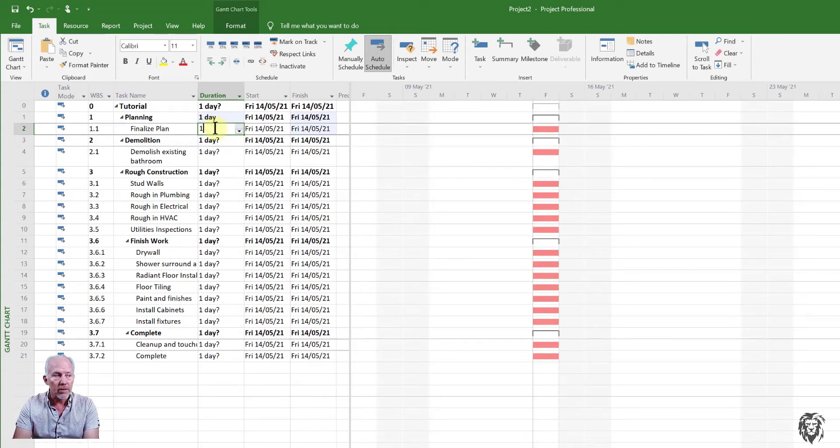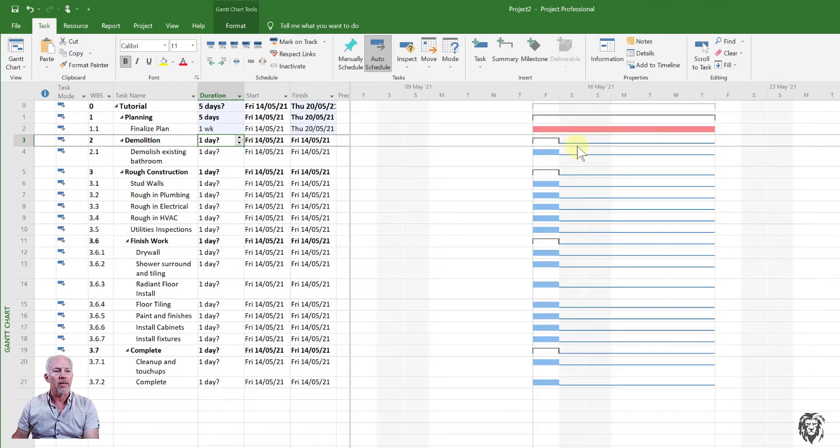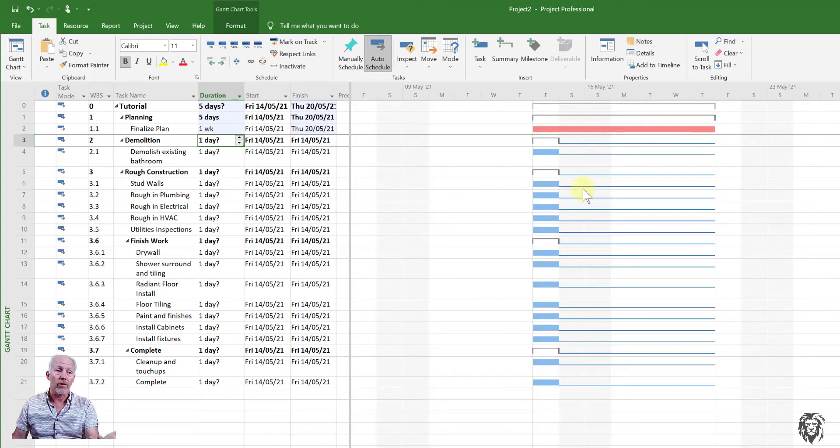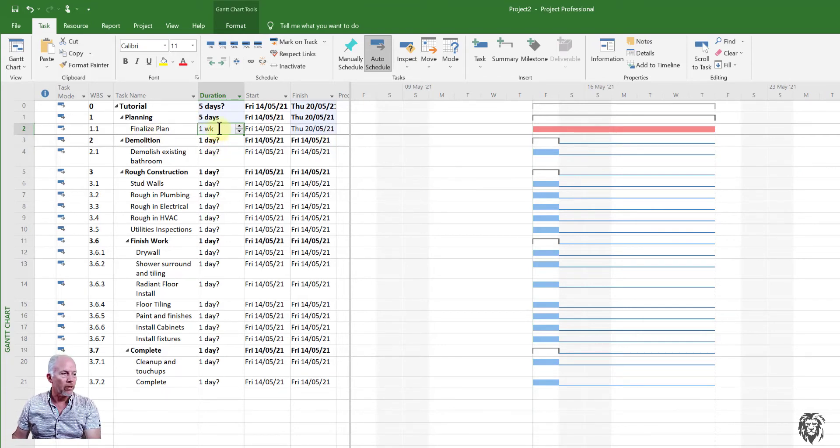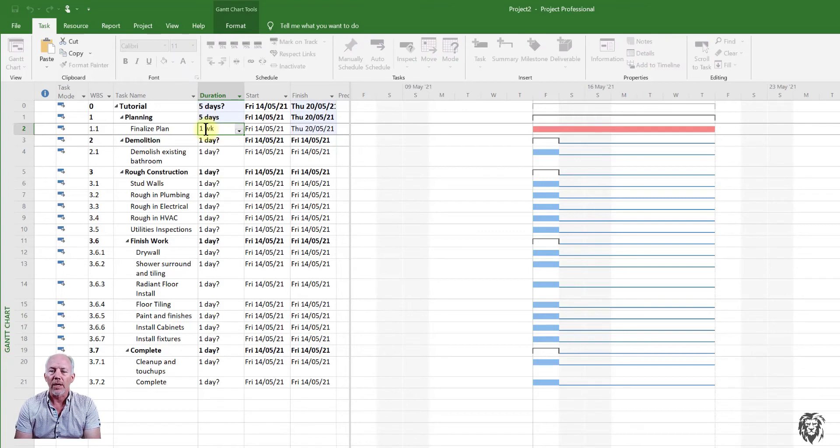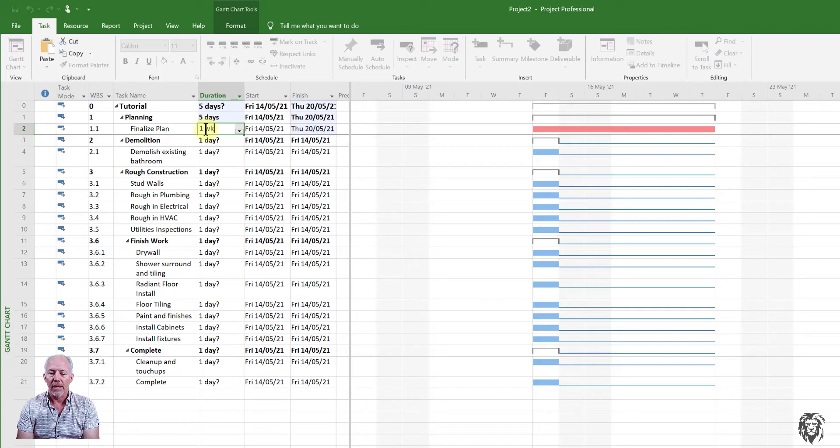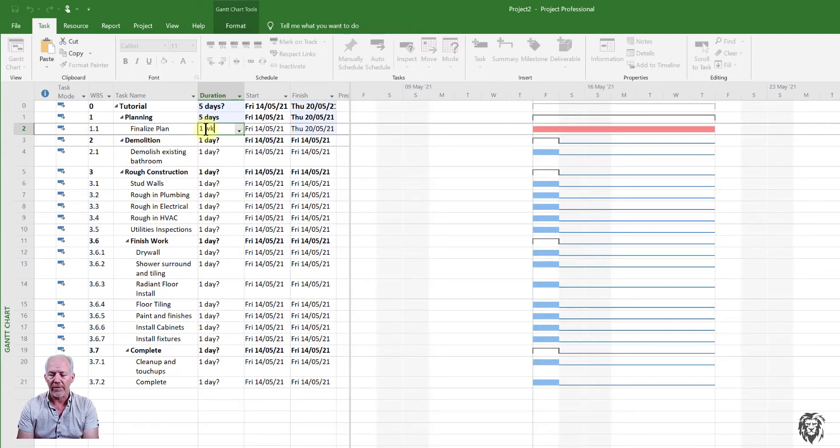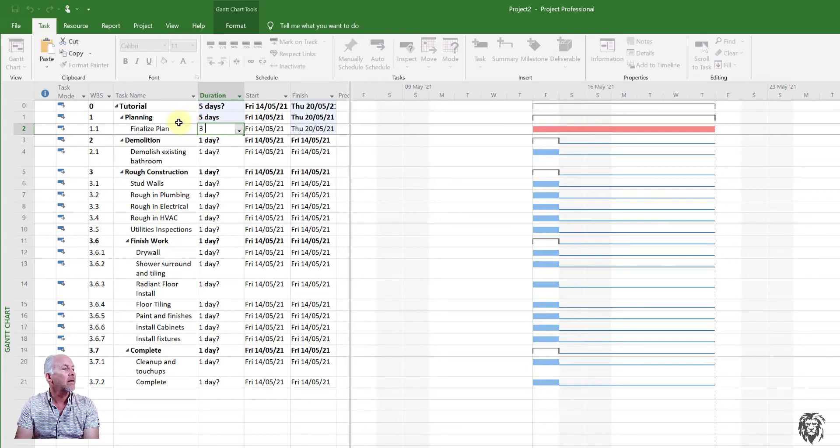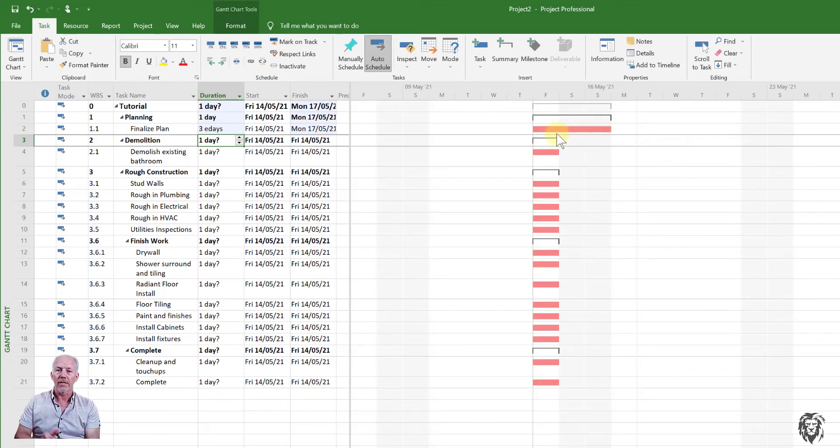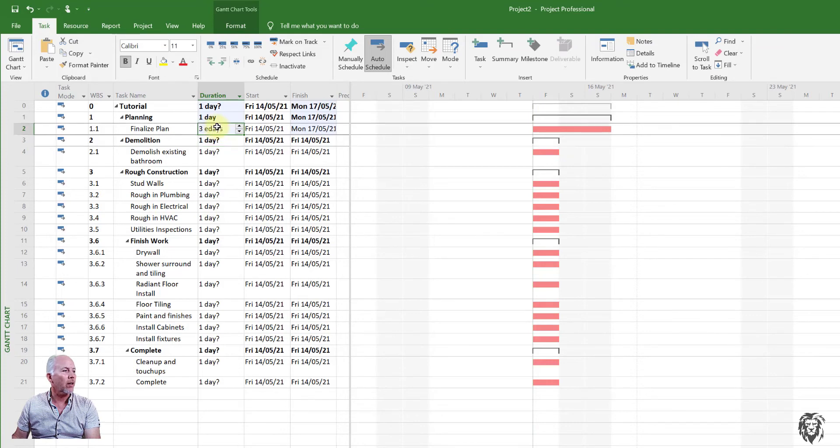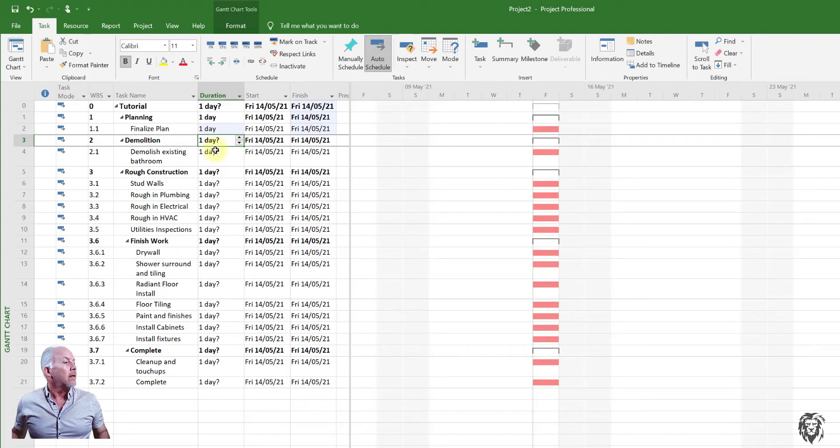And of course, now it's the longest activity. So all the other ones are no longer critical. So we're seeing some of that information being displayed automatically. But let's ignore that for now. The one, and you can do months as well, but it's kind of silly at this point in time. So the one thing I did want to show is sometimes this is interpreting work days. But if you, some activities just take up elapsed days, which is to say continual days, including non-working days, so over the weekend. So for example, if you were putting in an activity to cure, wait for concrete to cure, for example, you could say that you want to have three elapsed days. And we just put an E in front of the days. And you see here that it's going over the weekend, it's including the weekend in those elapsed days. So just so many different options, we're going to go back, we're going to make that one day.